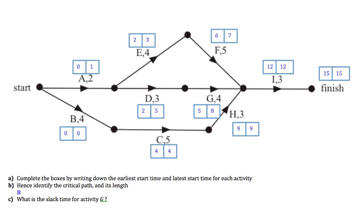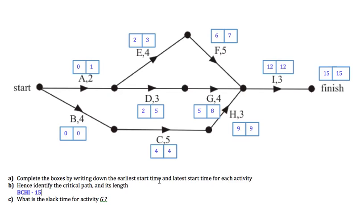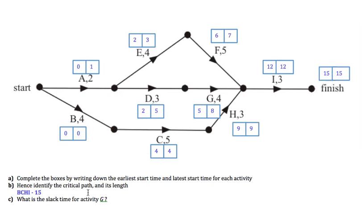The length of the critical path is the sum of all the durations: 4 plus 5 is 9, plus 3 makes 12, plus 3 makes 15. We knew that because it matches the overall project completion time — the critical path always gives you the overall completion time. Note as well, we could have answered this without setting up the boxes since there were only three paths from start to finish. For small networks, you can simply identify the longest path; it only gets tricky with many paths.